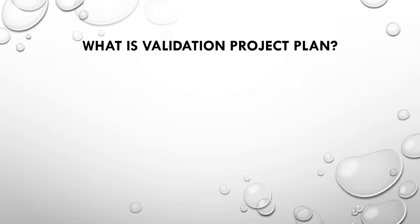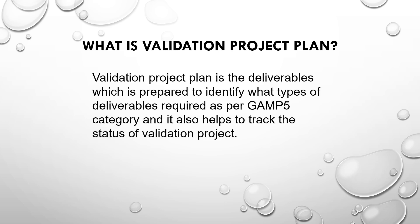Now what is validation project plan? Validation project plan is the deliverable which is prepared to identify what types of deliverables are required as per GXP category, and it also helps to track the status of the validation project. Basically this document is where we need to mention the name of deliverables as per the software categorization and track the progress status of the validation activities.